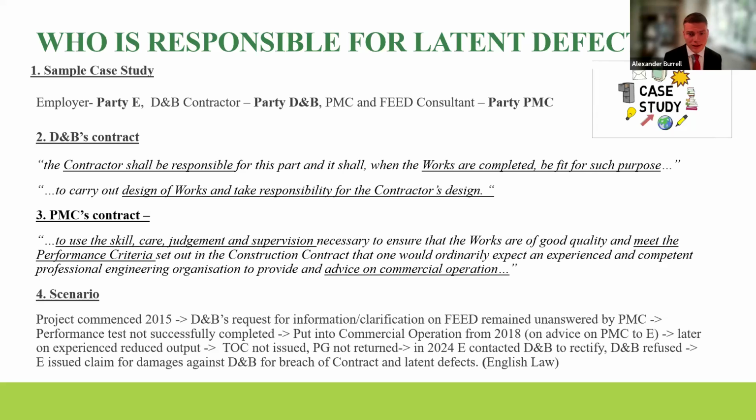Here it says that the taking over certificate's not been issued. That doesn't necessarily mean that practical completion hasn't been achieved, but that is clearly one of the risks for the employer in commencing litigation, at least on the basis of contract in this scenario. But tort claims would be different. As stated, it would be 3 years from the knowledge of the defect and that it was caused by the alleged negligence. We don't have the information on this, but that would be something that would need to be established before you look into it.